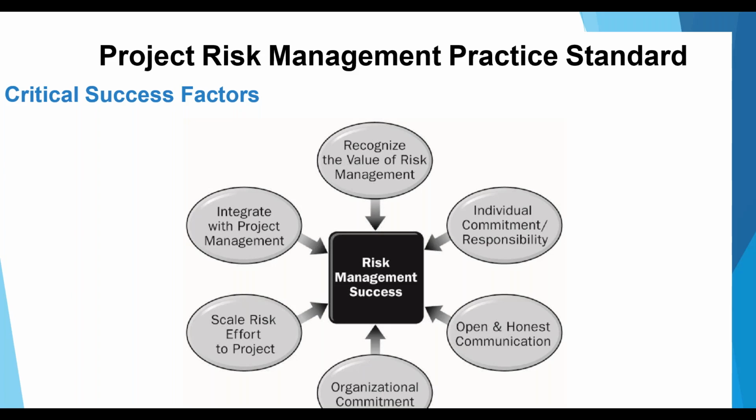And next is the risk effort scaled to the project, because whatever activities you are doing in managing your project risk should be consistent with the value of the project to the organization and its level of project risk as well. In particular, the cost of project risk management should be appropriate to its potential value to the project and the organization.